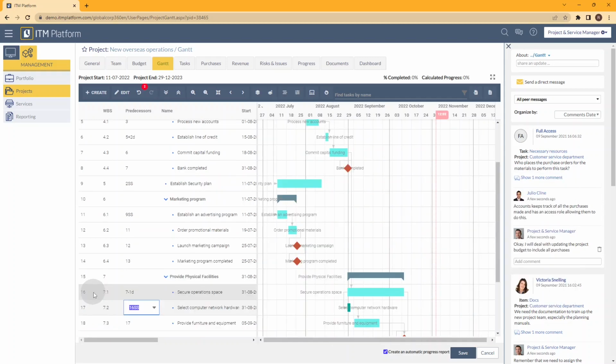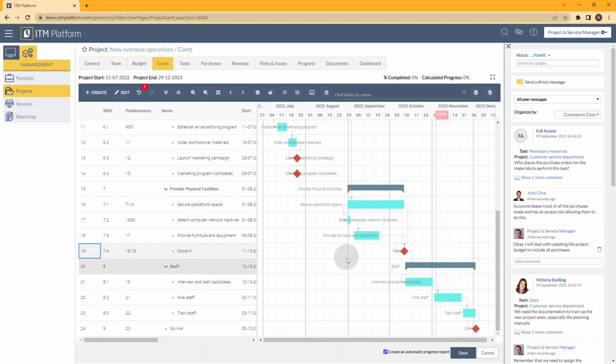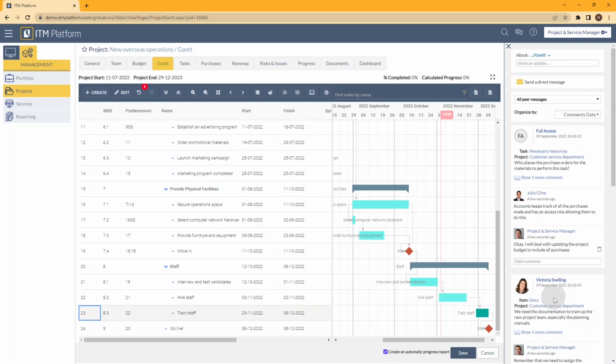I can also have multiple dependencies. This is important when in my schedule I have multiple paths, which is common. So to add more dependencies, we can do just as we did before, or we can simply add a semicolon in between the IDs of our linked tasks. When I make these changes, I can also select certain tasks that have been modified, and if I want to make sure that I'm following the dependencies, I can click this button, Automatic Task Scheduling by Dependencies.